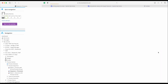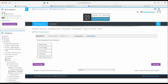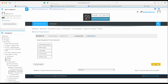Now here it's talking about Scope Management: Create WBS, Collect Requirements, Define Scope, Control Scope, Validate Scope. Which one comes first? Collect Requirements comes first, then we Define Scope. One person cannot do all the work, so we create smaller manageable items — that's Create WBS. In normal projects we keep controlling scope until we show it to the customer, and Validate Scope is when we show it to the customer.